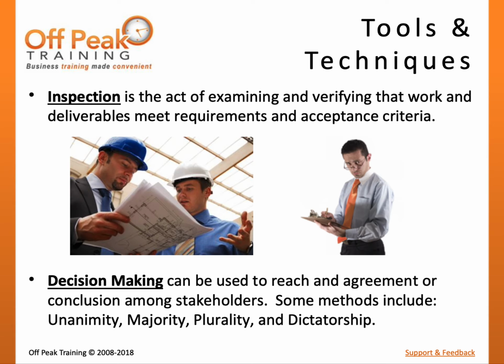The key tool and technique for this process is inspection. This is the process where stakeholders, often the customer, will examine the verified deliverables to ensure that all of their requirements and acceptance criteria are met. Other stakeholders besides the customer may be involved in Validate Scope as well. For example, on a construction project, local government may have inspectors to make sure that the building meets code and other regulations. Decision-making can be used to reach an agreement or conclusion among stakeholders.